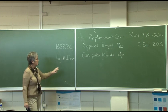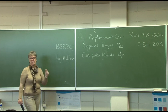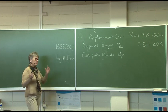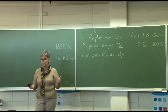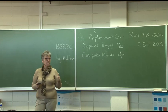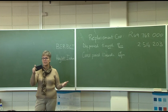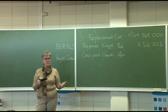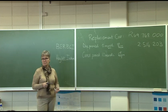So each and every month, as the contractor submits his monthly claim, he will build, and if it's a big contract, the contractor has got a quantity surveyor. They're like the accountants of the building industry. The contractor has a quantity surveyor, and the client has got a professional quantity surveyor. So the two of them will go on site, and they will literally measure, people.